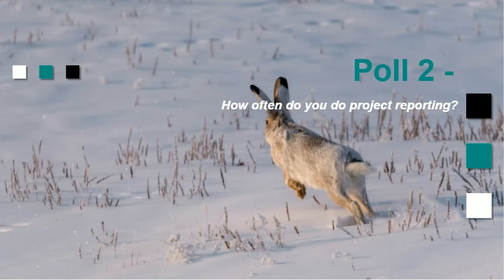How often do you do reporting with your group? Okay, so depending again on the kind of projects you're doing. So daily is turnarounds. Anybody doing a shutdown, an outage, a turnaround, daily is what you need in those kind of projects. You might have, for a huge number of man hours being spent every day. Weekly, if you're on a capital project, monthly, and others. So it looks like quite a few groups are doing well with weekly reporting.